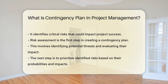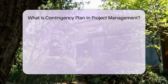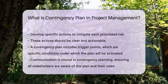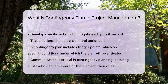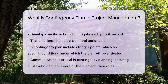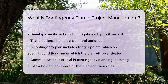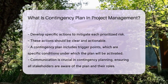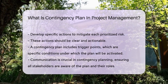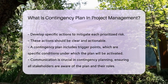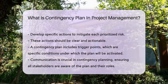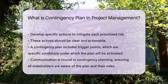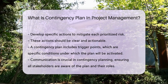These actions should be clear and actionable. A contingency plan also includes trigger points — specific conditions under which the plan will be activated. Communication is crucial in contingency planning. All stakeholders must be aware of the plan and their roles in it.